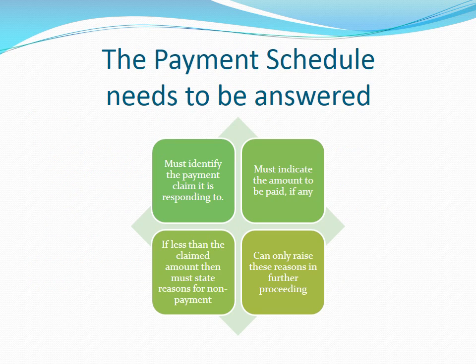The payment schedule is the client responding to your claim for payment. It is the respondent explaining why they will or will not pay what you are claiming and the reasons for their stance. When sending a payment schedule, the respondent must address the 4 points now shown on the screen.